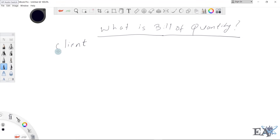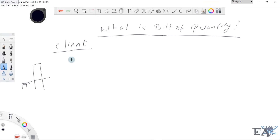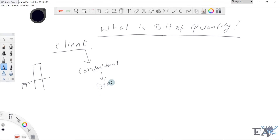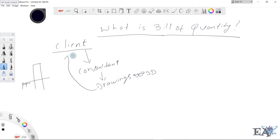As a client, you want to build something — suppose you want to build a nice-looking pillar at ground level. You have a concept of this pillar, so you go to a consultant. Based on your concept — what kind of pillar you want, why, and where — the consultant will prepare drawings, including conceptual drawings and 3D views. You discuss changes, finalize the drawings, and confirm you are satisfied.